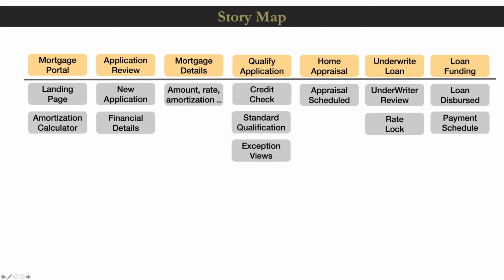So I'm sure you can realize that there are some activities that are must-have. And this by no means is an exhaustive list of stories. But as you start to build out each functionality, you can add more stories underneath. And then probably just by drawing a dotted line, you could figure out what you need for the minimum viable product. So a story map helps you focus on a feature functionality that has a workflow and helps identify stories that relate to a specific feature. And you can break them down into must-have and nice-to-have items.